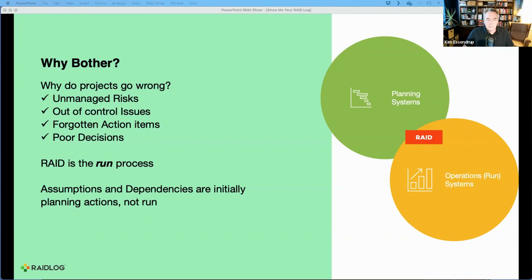And I'll make an assumption that the dirt in my backyard is normal. Those are planning assumptions. And then if it turns out that your planning assumptions were wrong, well, then your project is in the skids, which really starts to sound a lot like a risk. So I would say when you start your project, you've got a number of planning assumptions like, oh, I can find an affordable contractor, I've got dirt, not stone in my backyard, or I can get planning permission within a month. Those are all risks. So they should be the first things you put into your risk log.